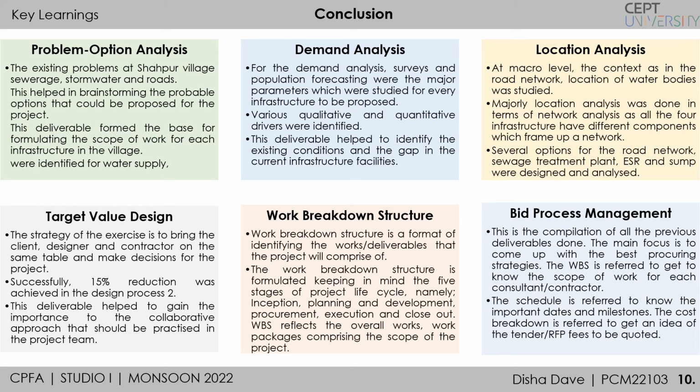Coming on to the work breakdown structure for village infrastructure development, this helped to identify the exact scope. Also, it formed a major base for identifying the work packages and the people, and the procurement strategy was at a great benefit by framing a good work breakdown structure, as the scope of work helped to identify and give resources, like under whose scope what will come.